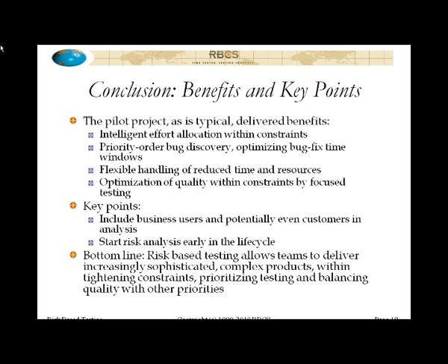They also wanted to start the risk analysis earlier in the life cycle. They wanted to start it in parallel with the requirement specification phase, which on a sequential life cycle model is definitely what you want to do. You maximize the benefits if you do that, particularly some of the side benefits of identifying problems in the requirements, but also just having the tests written in risk order ensures that the greatest amount of attention is given to the most important tests.